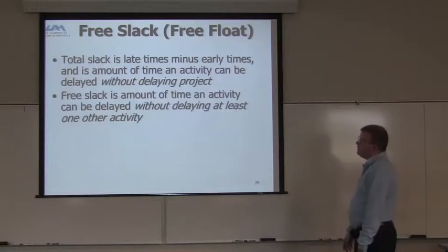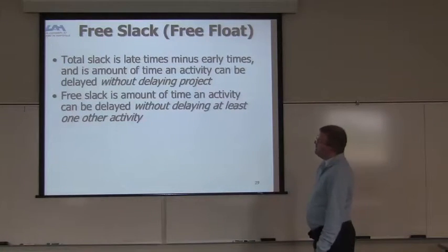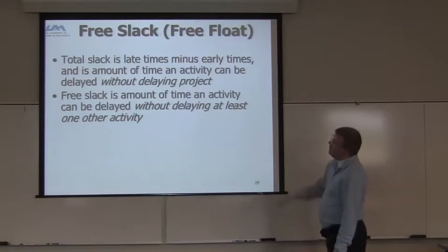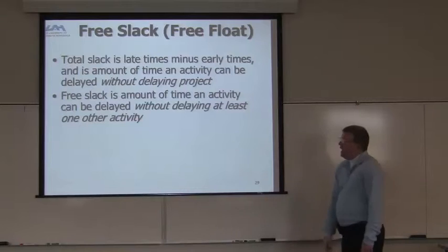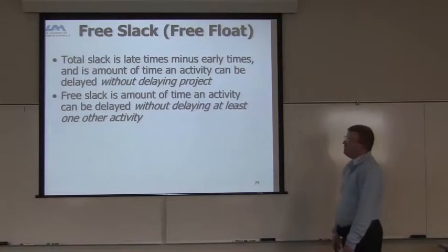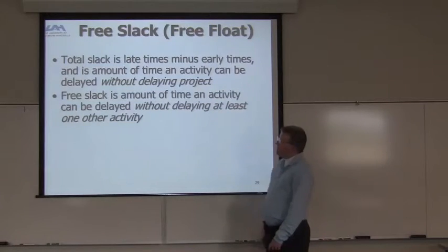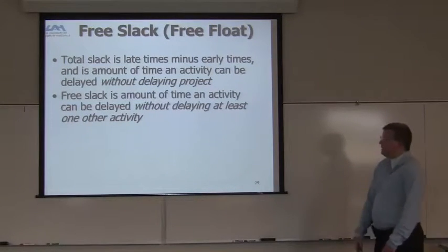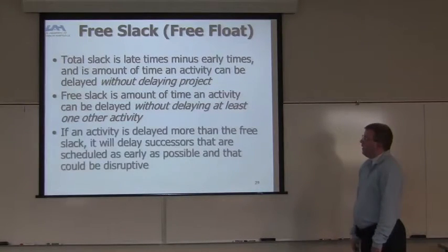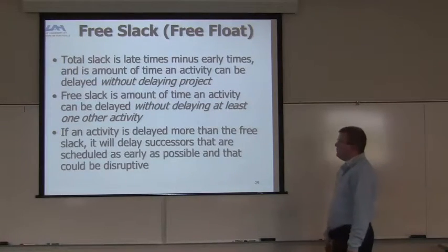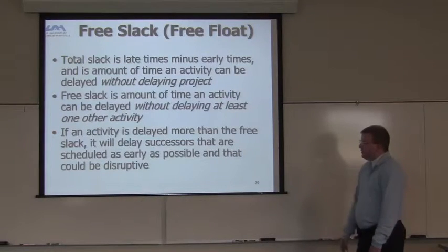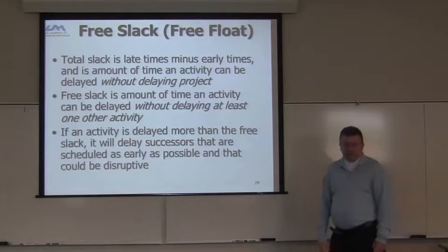Total slack is late times minus early times, and its amount is the amount of time an activity can be delayed without delaying the project. Free slack is basically the amount of time an activity can be delayed without delaying at least another activity, right? If an activity is delayed more than the free slack, it will delay the successors that are scheduled as early as possible, and that could be disruptive to the project.